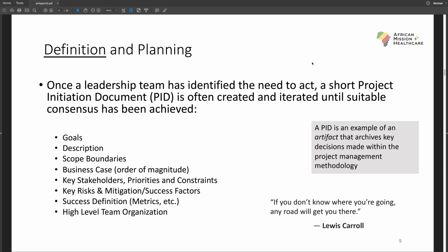So if you've got a project plan to paint one of the buildings on your campus or at your institution, saying which rooms are out of scope and aren't going to be painted and which ones are in scope would be a simple example of a scope boundary that we could all identify with.